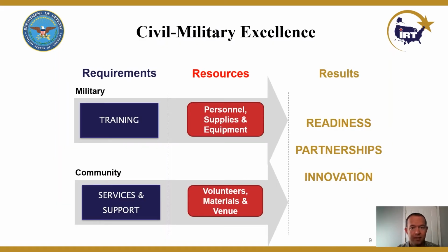This slide really gives you an opportunity to, again, talk about the community partnership we have. As you can kind of see, the military basically brings personnel and equipment and tools, but we depend heavily on our community partner for this project to go right. They provide venue, they provide some volunteers depending on the project, and the big thing they provide are materials, in addition to drawings and coordinating permits and coordinating specific contractors, perhaps electrical and mechanical contractors, to work under their license.